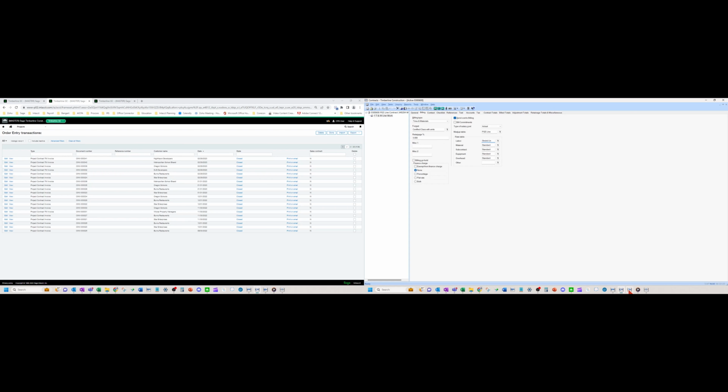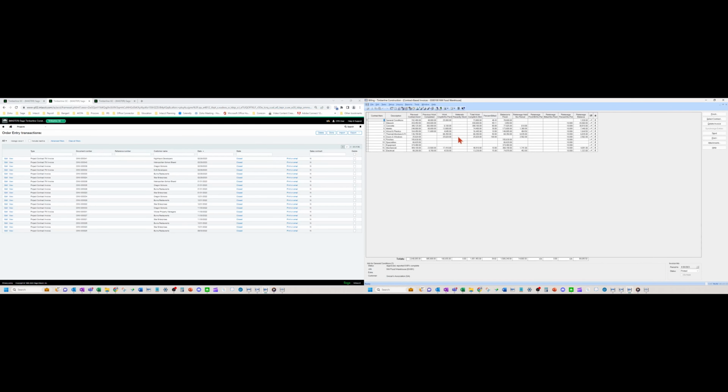So in the billing module, I set these up. And if I have a cost type of material, it's going to look to this to see what to do with it. Does it pass it through at cost? Does it mark it up with a percentage, etc.? So over here in the billing module, the rate tables here are where you set that up.